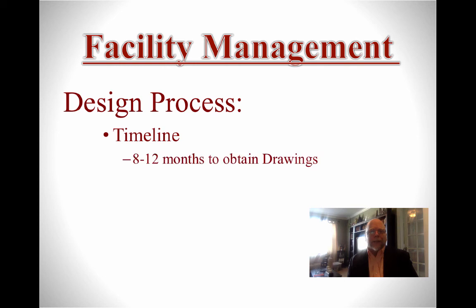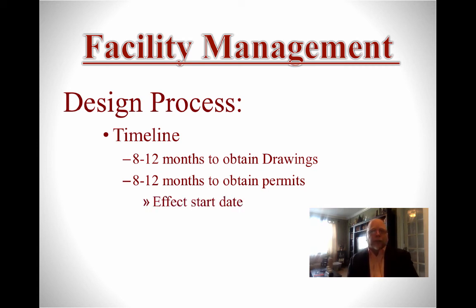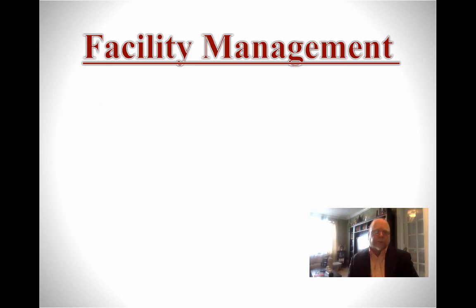And timeline. Think about timelines in your design process. Just for the drawings, the schematics themselves, the topographical, it's going to take about 8 to 12 months, and then when you get your permits together, it's going to take another 8 to 12 months. So even before you break ground, you're looking at about a year. You need to get these in place because this will definitely affect your start date, what materials you need, when you need to get things delivered, all that good stuff.